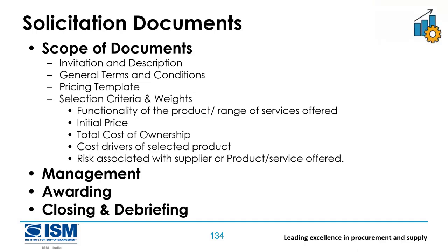It comes with a GTP and pricing. Pardon? Guaranteed technical parameters and then a pricing. For pricing, we normally ask for the cost breakdown, but some suppliers give it and some suppliers give a lump sum.